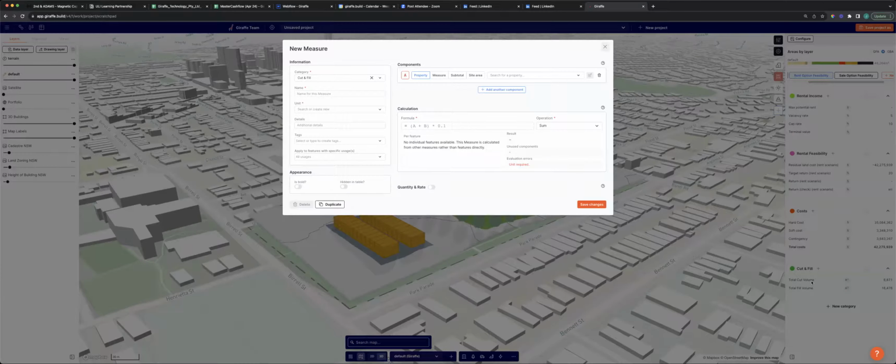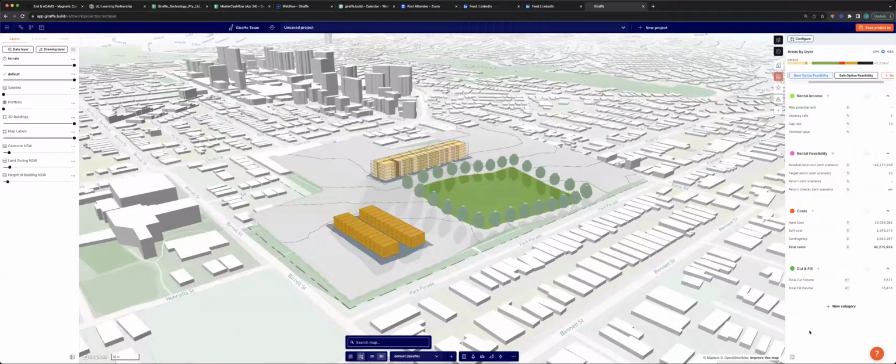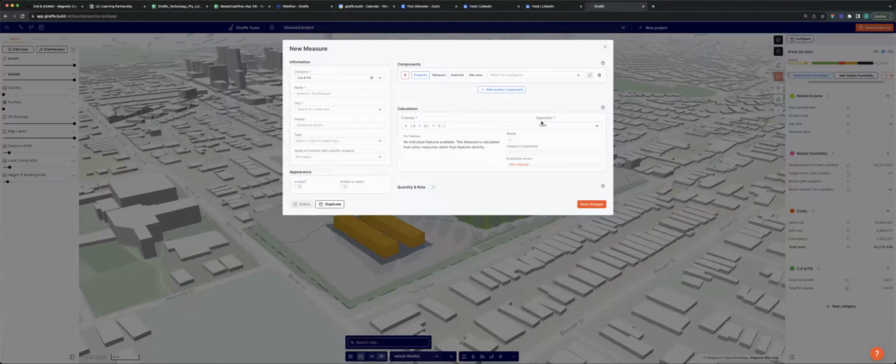So if I wanted to grab one of these measures and apply cost to it, I can do that. In my case, I'm going to oversimplify this, and just take the fill less the cut, and then apply a dollar value to the soil that we need to truck into the site. So I'll add a new calculation, and I'll take a previous measure, which is the total fill volume.